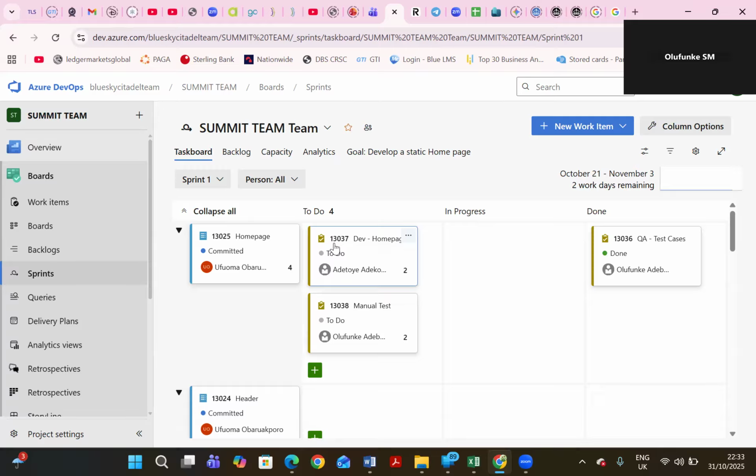The effort is collaborative. This is what is going to take us to do this work based on complexity and everything. So that is not what you're seeing on the task. Your task is counting hours. It's going to take me this many hours to do this thing. While on the story, what you have is an effort. It's going to take us this big effort to do it based on some factors, which I've explained to us when we were talking about it the other time. That's the strength, the capacity, and the technical.